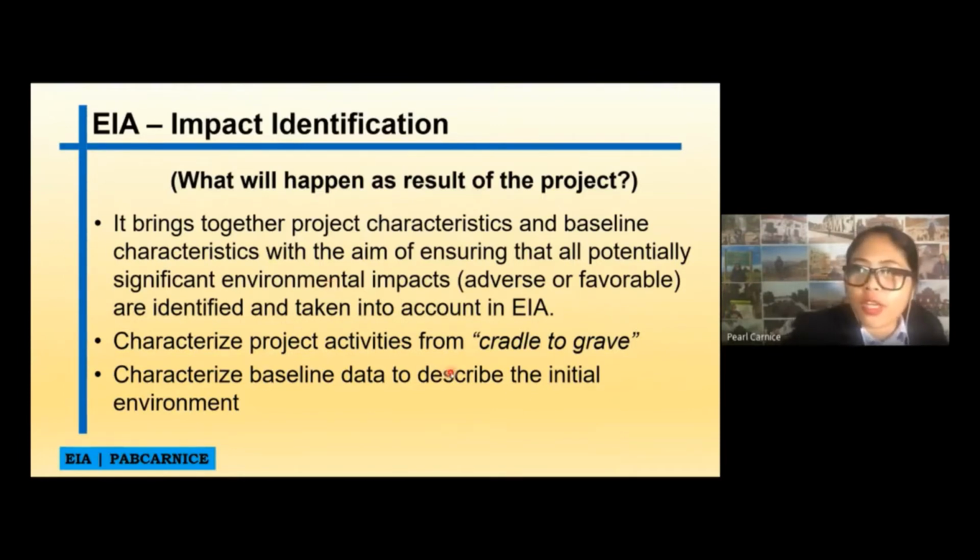And then of course, characterize project activities from cradle to grave. So when you say cradle to grave, from the moment it was not created yet up to its, let us say, decommissioning or abandonment phase. So from pre-construction to construction to operational to the decommissioning or abandonment phase. So we have to consider that with the impact identification.